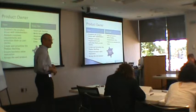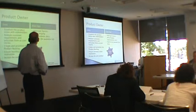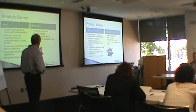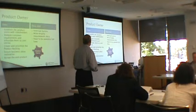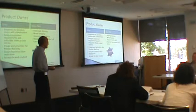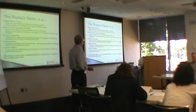Everyone always wants to know that everyone else is being trained. We need to get all the team members in the room and have them understand their expertise. The Product Owner establishes the product vision, analyzes customer requirements, writes user stories, raises and prioritizes the product backlog, focuses on business value realization, and ultimately accepts the end product. The Product Owner does not write blanket requirement documents and does not ultimately have to be full-time.